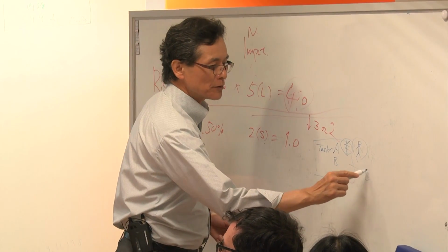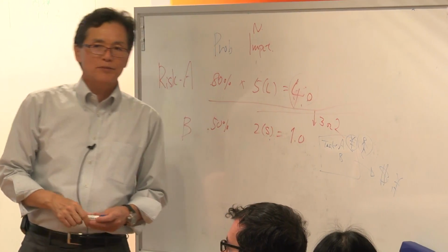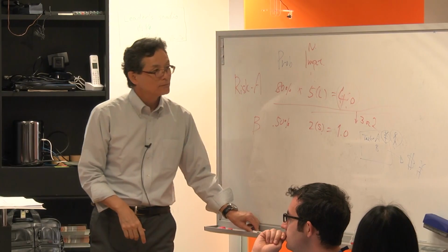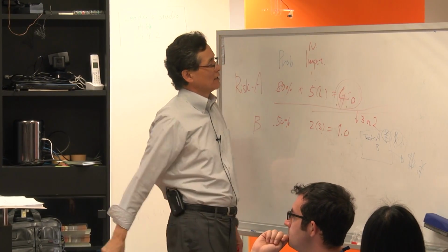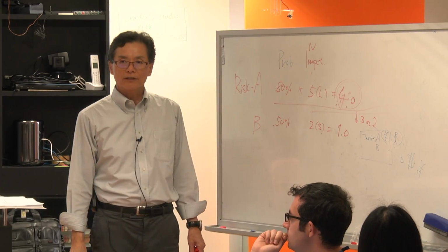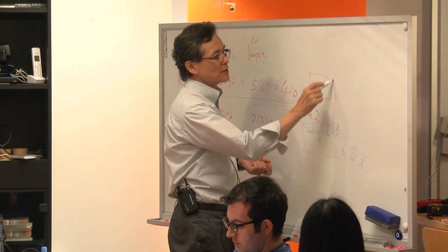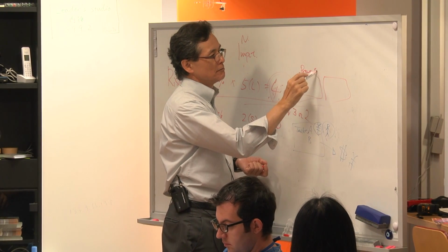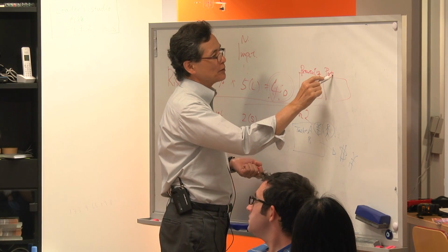So this may go to some preliminary funding or buffer. For high score risks, we suggest you need 2 sets of actions: preventive and post-mortem.